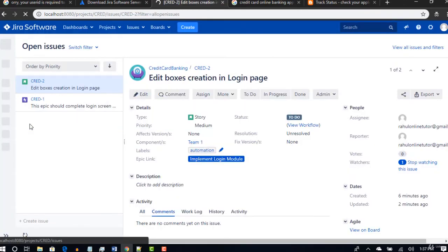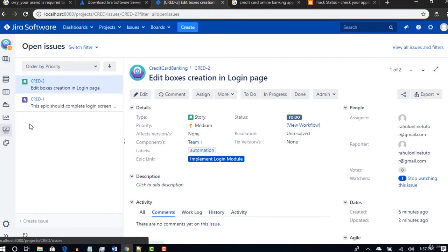I'm just showing how you can link all these details, because your manager can create a release date and give a deadline that this login has to go out, and all your user stories have to link to that release, so that at the time of release you can go and see what stories we are going to release in that specific release. That details you will get if you tie that story to that release.